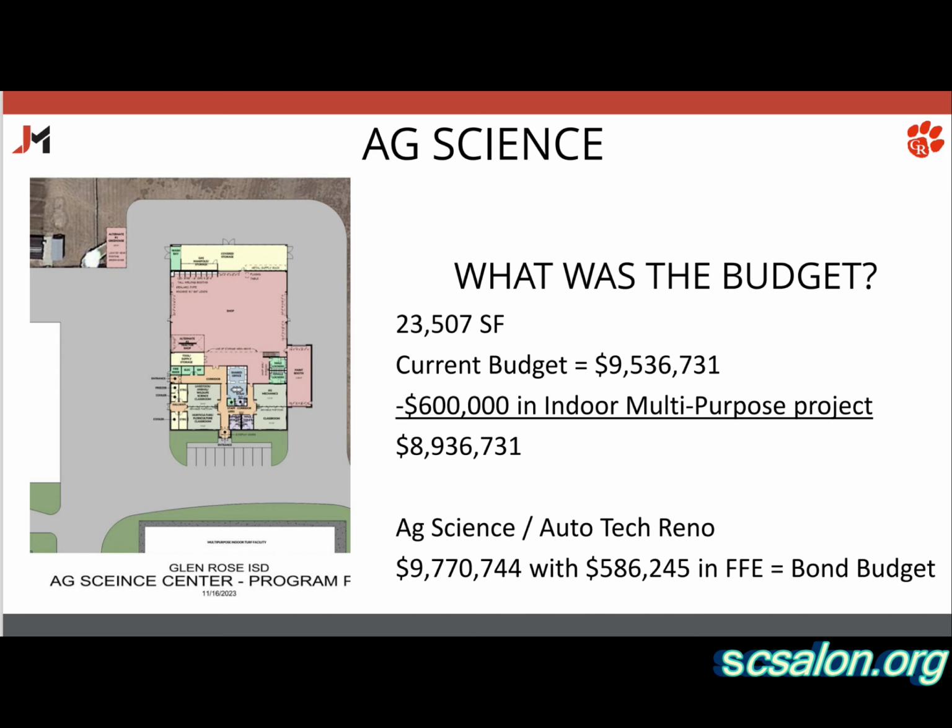The original restrooms were $1 million, right? That we had that addition. The original restrooms, yeah. We talked because it was so long. We had 9 fixtures in the women's and then 5 fixtures in the men's. And so we went and spoke with the city regarding that, and we got it down to 3 fixtures and 2 fixtures. So 3 in the women's. And that's a code requirement. That's not just because we wanted to put 12 in there.